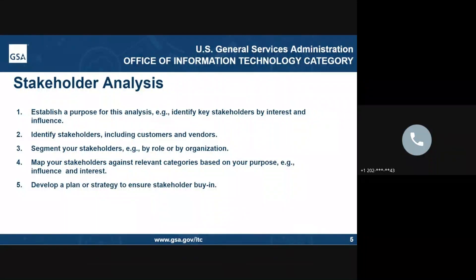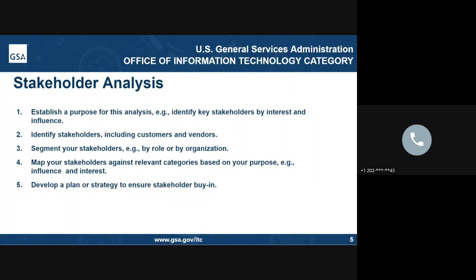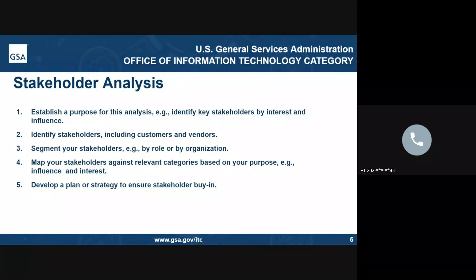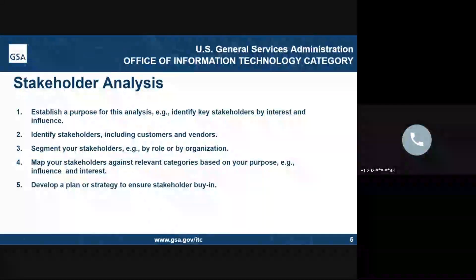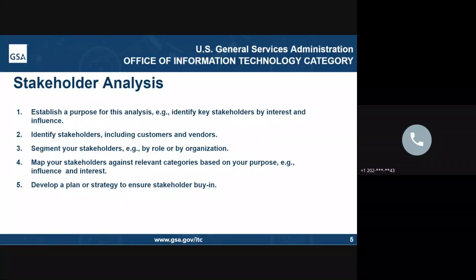One note on mapping of your stakeholders: you'll have to do this against purpose-based relative categories within your organization. These categories should either be based in the interest of the move — the department or software type that is more important than another — or how the department specifically influences the technology being used or upgraded to. Part of this should be frank discussions between the stakeholders on the order of the move and why. Sometimes there are technical reasons, like network infrastructure before an app server move, and sometimes they are strategic.